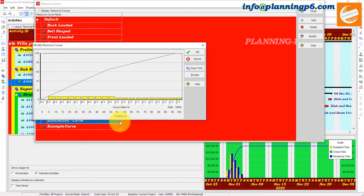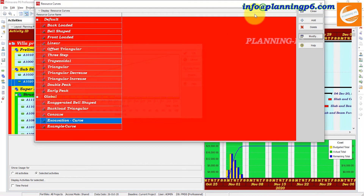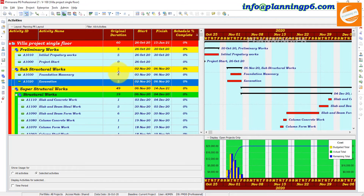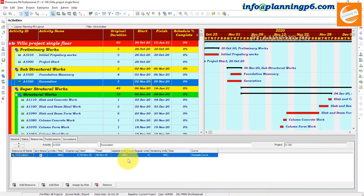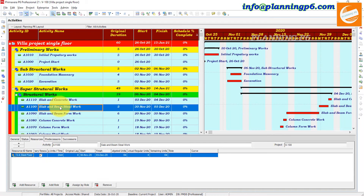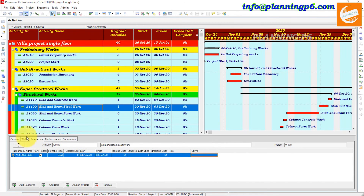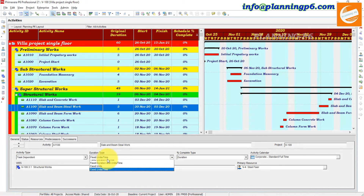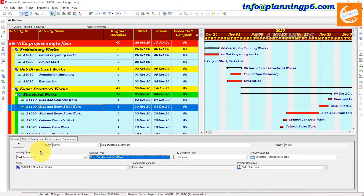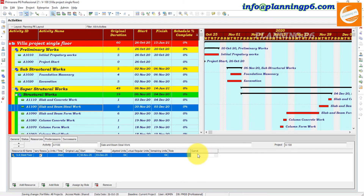Hopefully this tutorial is helpful for you to create different resource curves. You can create different resource curves for different activities. For example, just change the activity duration type from Fixed to Fixed Units/Time, then come to the curve assignment.